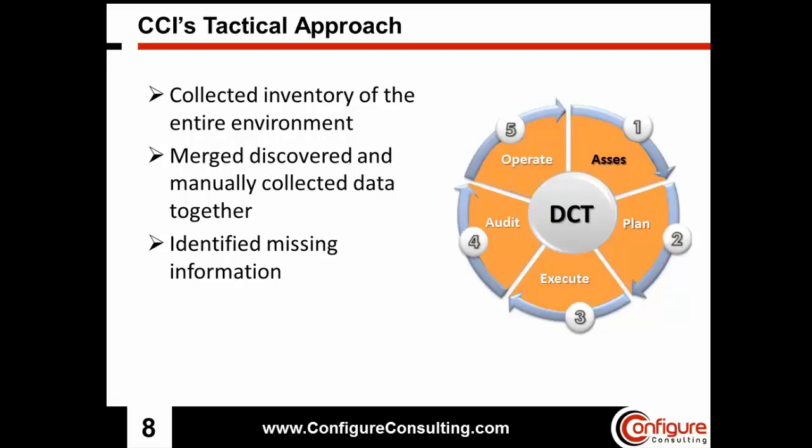We want to try and get a complete and accurate picture of all of their servers, but not just the servers in a static list. We want to see server-to-server communications. We really need to understand those dependencies in order to carve out and create our move groups accurately and lower the risk as much as possible.